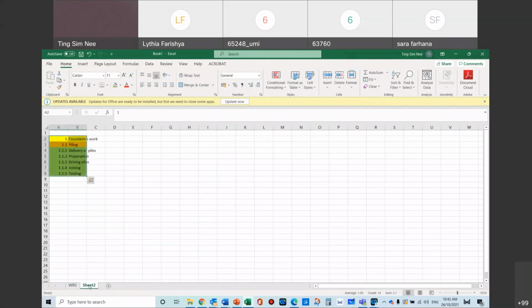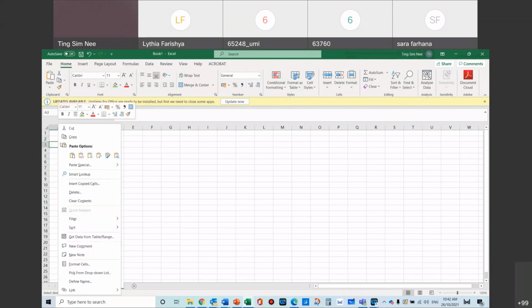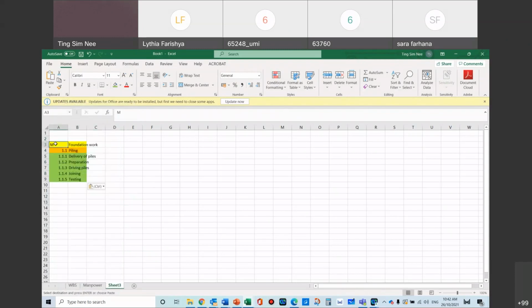Now in this first set of worksheets, you can call it the manpower worksheet, okay? And then you can open another one later on. It's going to be the same work breakdown structure that you copy and paste many, many times. So we're going to call this one machinery. So you're going to have material, machineries and all that.